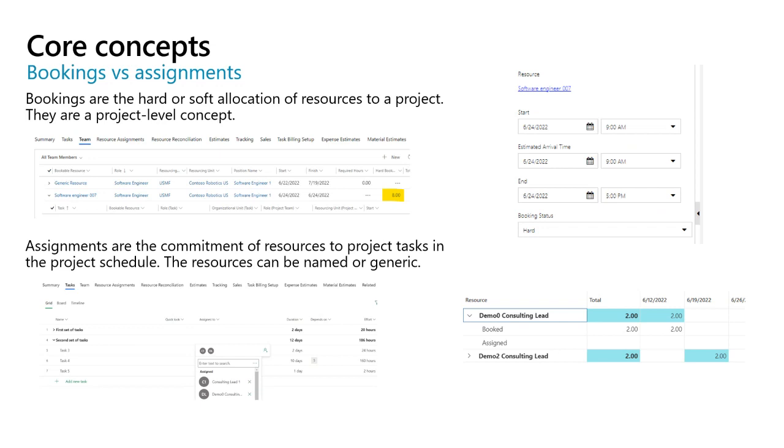For team members, bookings and assignments are loosely coupled. In other words, resources can have assignments but no bookings, or the other way around. Ideally, we would expect these two to be aligned so that resources have committed capacity to perform the task assignments. However, the bookings might be based on availability, task timings might change as the project continues, so flexibility is needed.